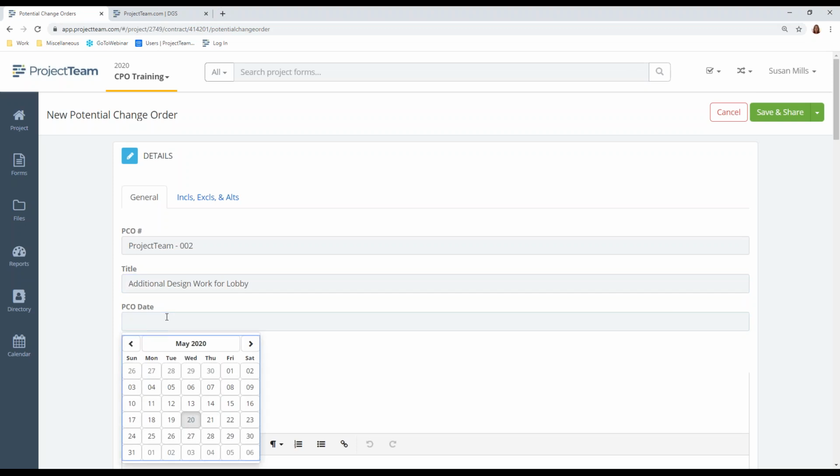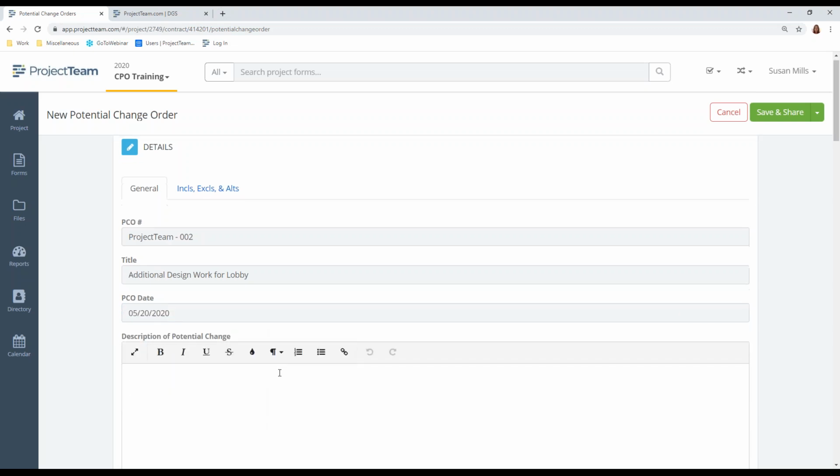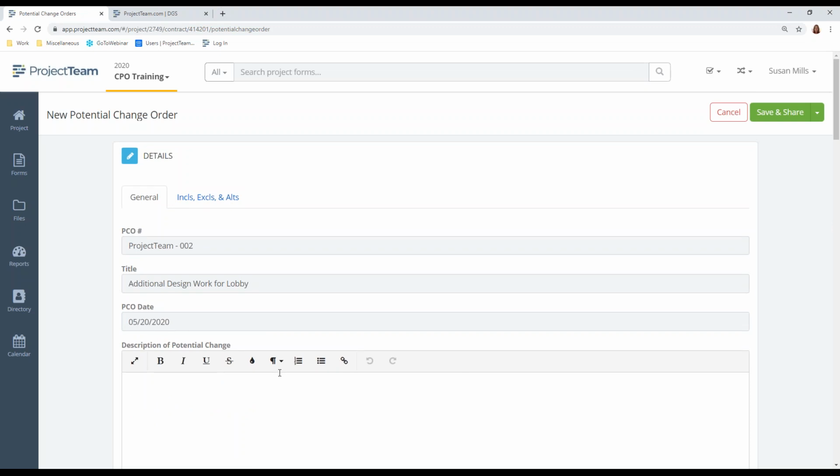Okay. I want to put in a PCO date. The PCO date should be the date of the creation of the PCO. If the PCO is not being immediately submitted, wait and enter the actual submission date. And you want to enter a description for the PCO.